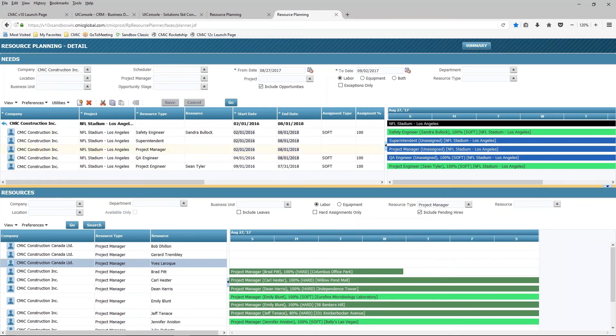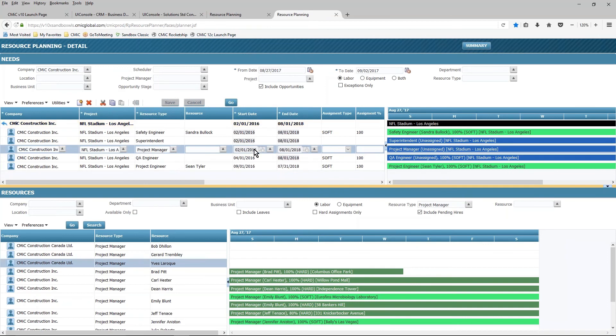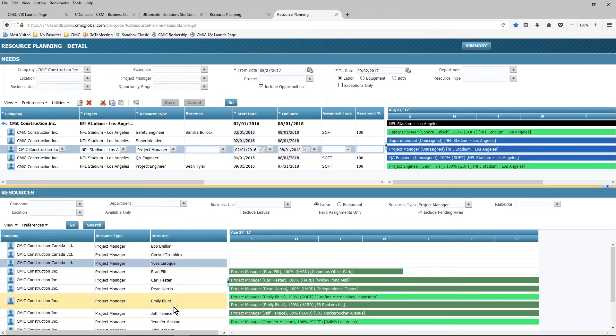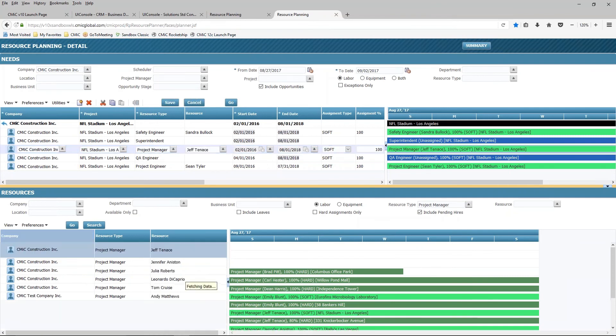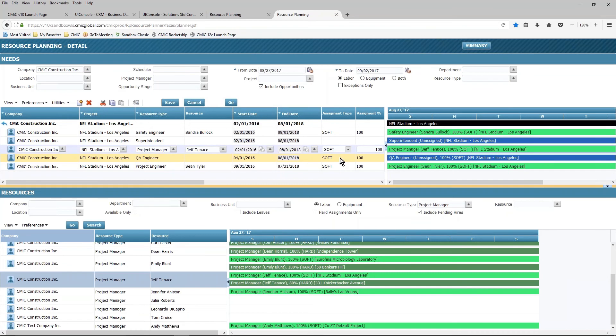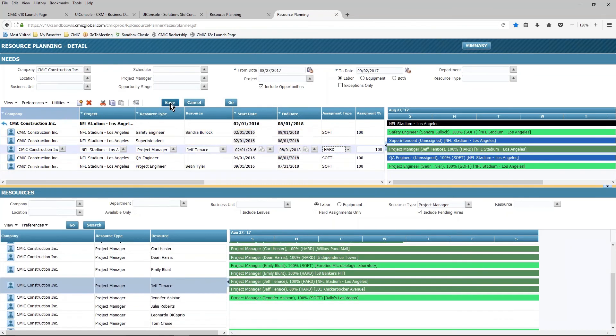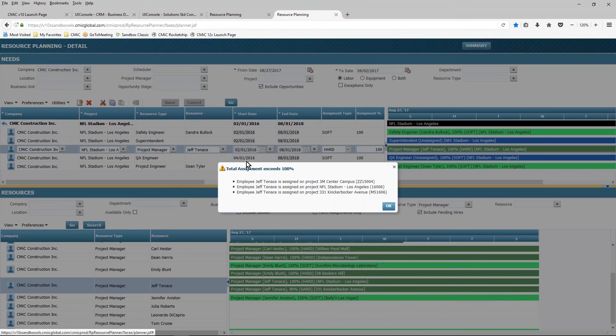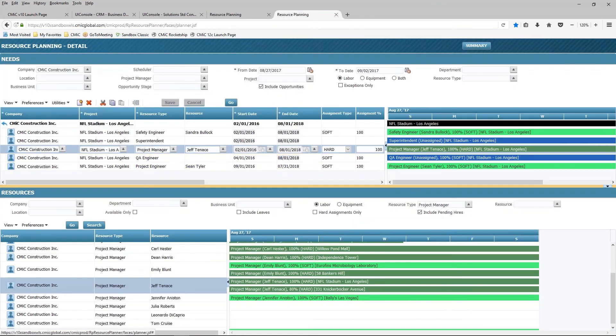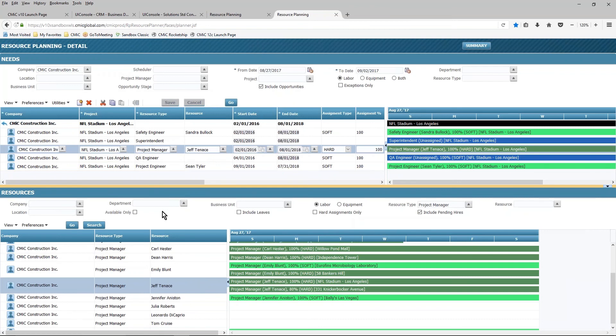I can go ahead and change the start and end date for a required resource. And one of the things that is also very handy is if I take a resource and I assign that resource to a particular need and I say, well, okay, that's good. I'm going to go ahead and move forward and hard allocate that. When I try and save what I've just done here, the system will warn me and I will get a pop-up that says this individual is already over capacity. What you're trying to do here, you can't do that because they're over 100% allocated. So you're going to have to make a decision and either change the resource or maybe redistribute the way that you've done the allocation.